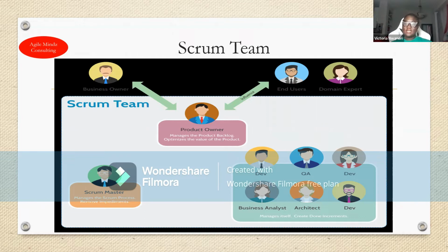So it's important to understand that they're more on the business side, so they're supporting the product owner and not necessarily the development team. But also some BAs do testing, maybe UAT testing or performance testing. They may contribute to the development team, but when it comes to estimation, only the development team has authority to do so.